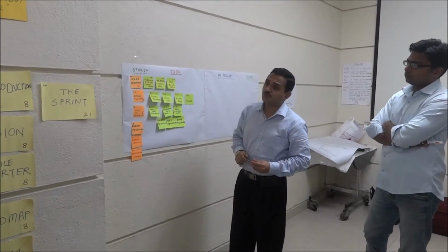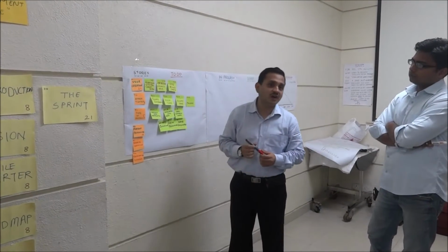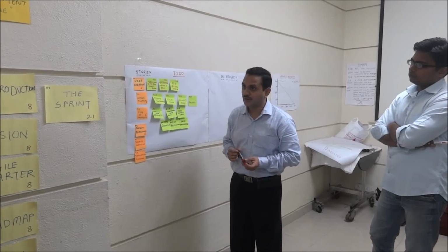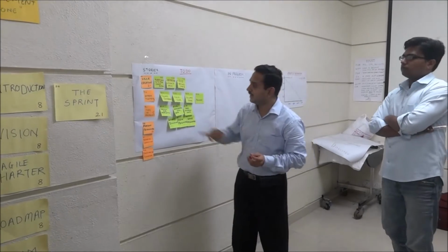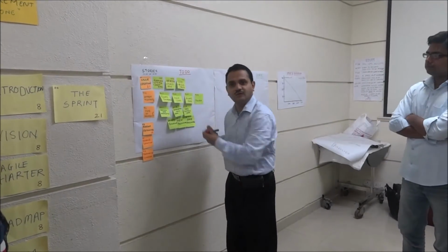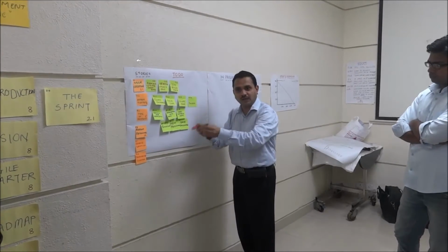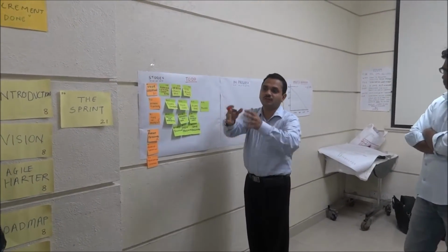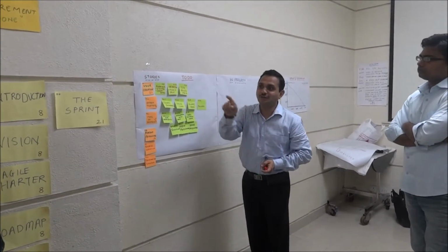The next thing is you will try and estimate each of the stories, how many hours it will take. This is the first time I am using the word hours. Until now I was only using story points. It doesn't mean that 21 story points equal so many hours. It is not a direct multiplication. So you will take each story or each task and discuss with your team members if required. But whoever is going to pick up that task will estimate.